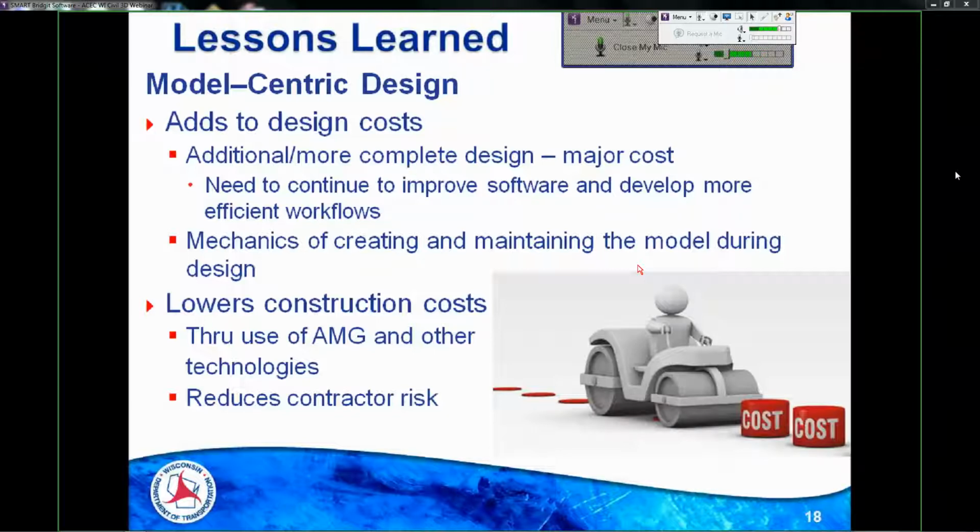There's one more thing I want to tell you about our design model, the new policy, and it's that the design model information that we're delivering is not contractual on construction contracts. It is a contractual requirement on design contracts, but it is not part of the construction contract.